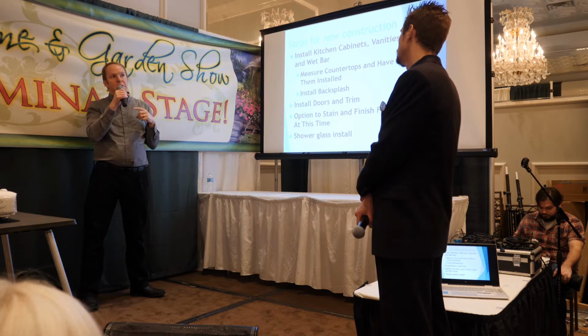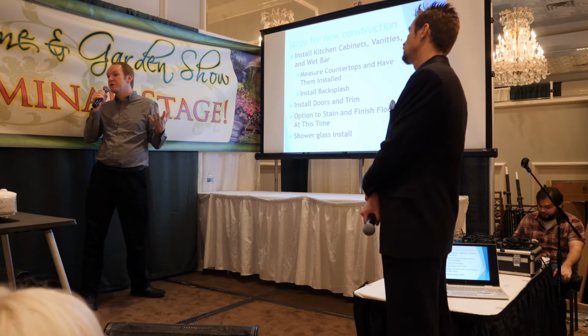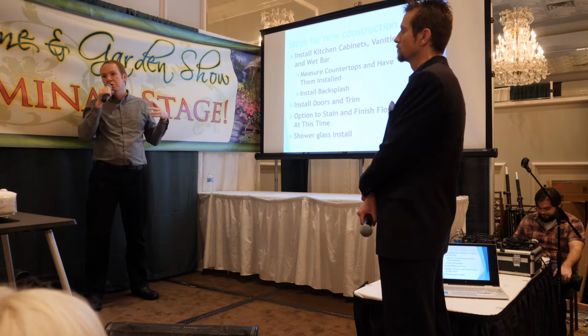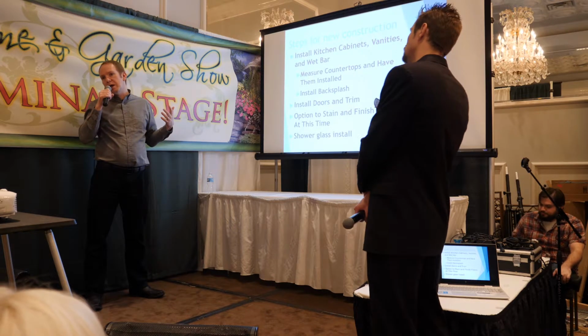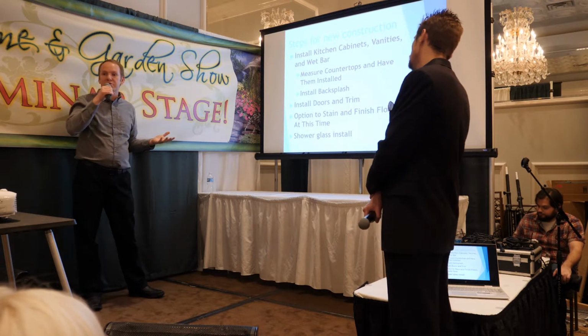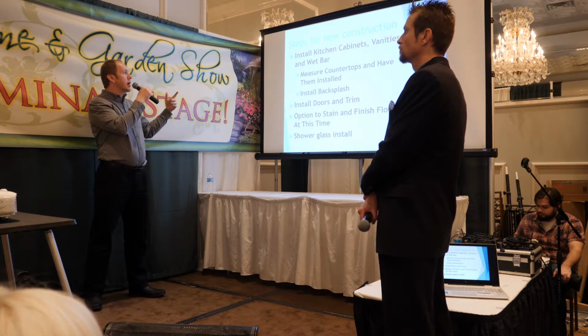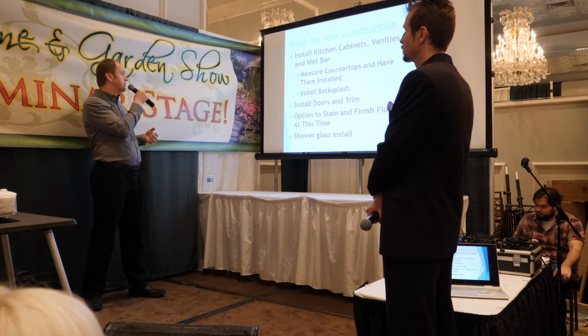The only issue with that might be if it's a custom cabinet company that takes anywhere from six weeks to 3 months to build your cabinets. If you wait till the drywall is done, then you may have issues with the stuff getting delivered to finish the job on time. But once those are in, measure your countertops and then have them installed as quickly as possible.